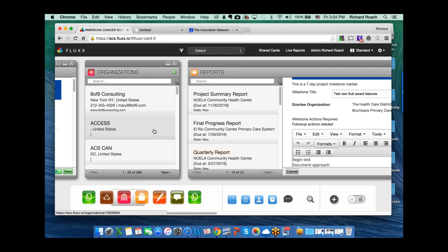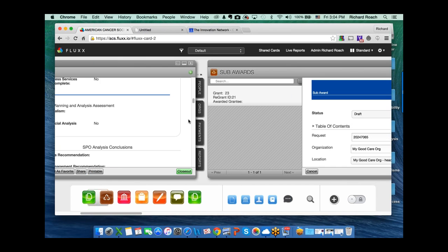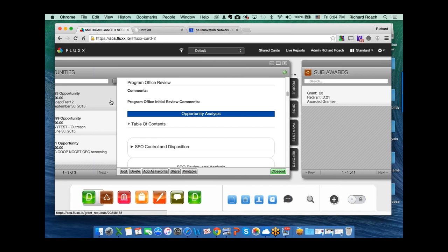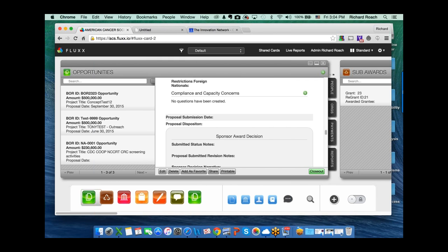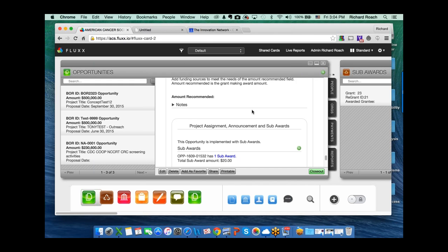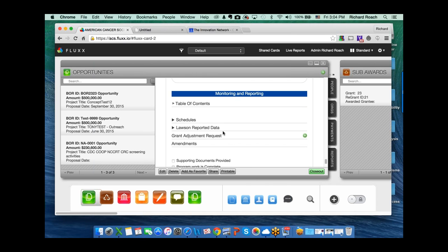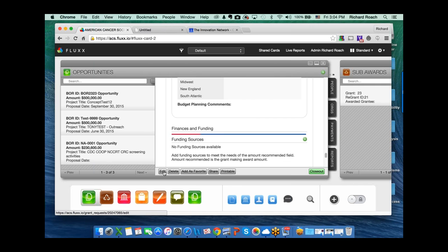And can we add more milestones, or are those it? You can add more milestones of date suspense duration or date suspense type to the list of available milestones, and you can add multiple milestones to any grant opportunity. So on this, you could add 15 milestones. You could schedule 15 milestones to this application. And then you just put those milestones at different dates, and you call those milestones different things.